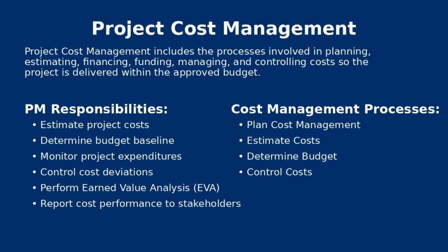Once you have determined the budget, you need to check the project charter and business case to find out whether there are any cost constraints and whether the budget is within the cost constraint. If not, you have to come up with options to overcome the budget overshoot, and you need to take it up with the leadership team in advance. If your project estimate is going to exceed the constraints, you need to explain to the management why the cost requirement cannot be met and what options are available to bring it under control. It is the responsibility of the project manager to come up with the most realistic, accurate estimate.